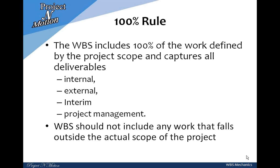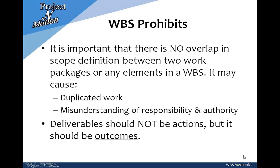Another important point is that WBS should not hold any work package which is not part of the project scope. By now it is clear that WBS plays a very important role in planning, management, and cost analysis. Therefore, even some minor mistakes in the planning phase may cause cost overrun in the implementation phase. Here are some precautionary measures to help reduce the chances of cost overrun. First, make sure there is no overlap in the scope definition of any two work packages — each work package should be completely independent, and deliverables should not coincide with another work package's deliverable. If not handled carefully, it may result in duplicate work and misunderstanding of responsibility and authority.